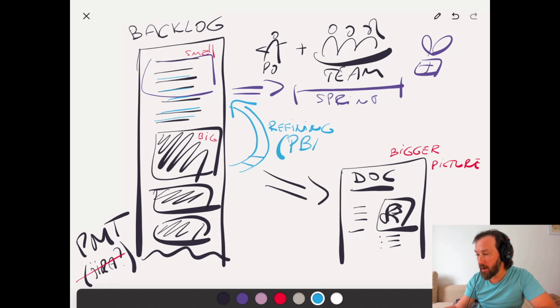Yes, and in Scrum, typically it's recommended that you have this process called PBR, product backlog refinement. Typically, teams will have regular meetings where they invite different stakeholders. Well, one stakeholder is interested in this item, another stakeholder is interested in that item, and in these regular product backlog refinement sessions, you would invite, of course, the entire team, product owner, optional, not optional, up to you, but of course, people from the outside who can help the team learn about these requirements.